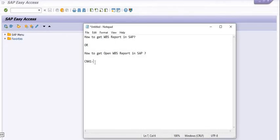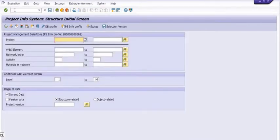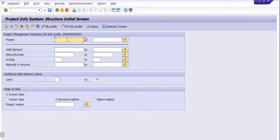There are various stages of this report. To get this report, there is a standard transaction code CN41. Using CN41, you can easily get the report for a project. If you have certain projects, you can get the status of those projects by filling in multiple project numbers here.